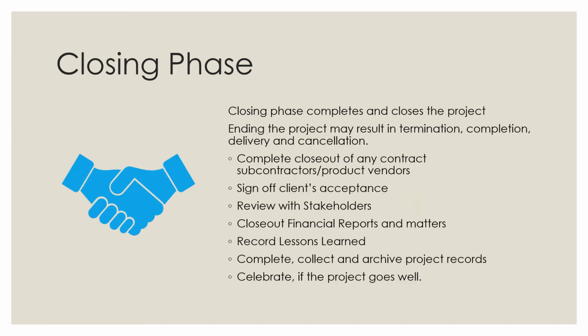Now I will be discussing the last phase of the project life cycle, which is the closing phase. Project closure involves handing over the deliverables to your customer, passing the documentation to the business, canceling supplier contracts, releasing your staff and equipment, and informing stakeholders of the closure of the project. It means project objectives have been met and the client or customer has formally accepted the project.